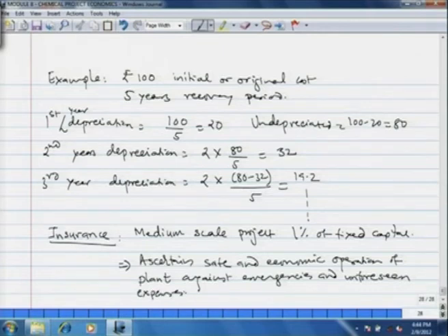Now there are different types of insurances. I will mention briefly the major insurance requirements. First is the fire insurance or similar emergency insurance on buildings, equipment and all other owned, used or stored property. Then public liability insurance, that includes bodily injury and property loss or damage. Then business interruption insurance, which is for loss of income due to business interruption caused by fire or other emergency calamities, which also result in loss of property. Then workers compensation insurance and marine and transportation insurance for all property that is in transit.